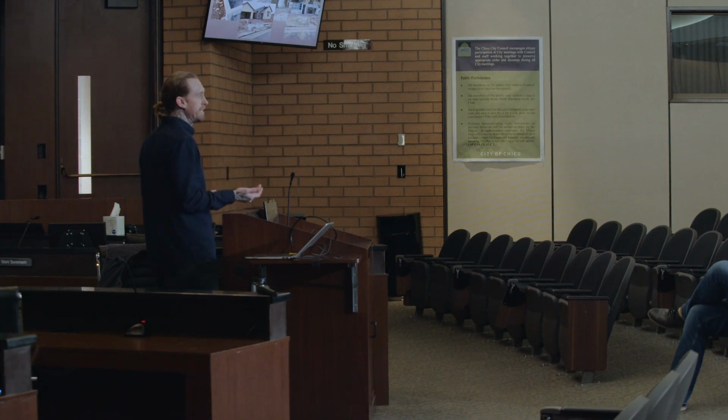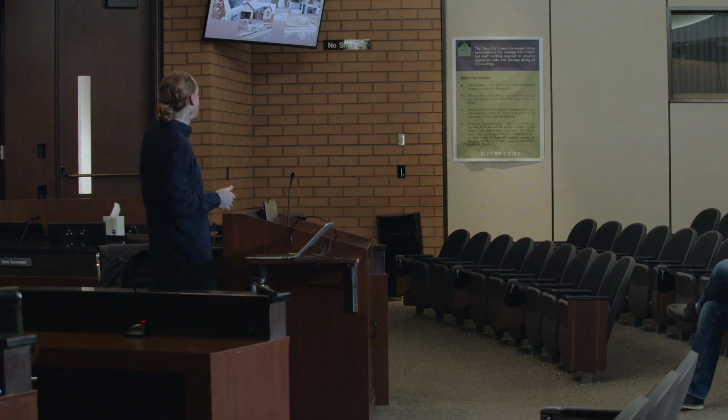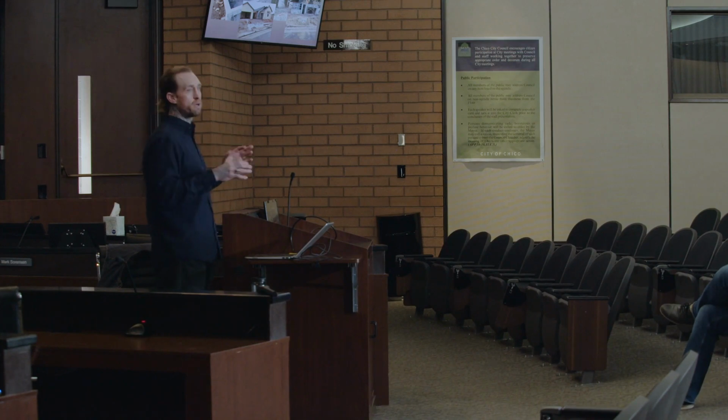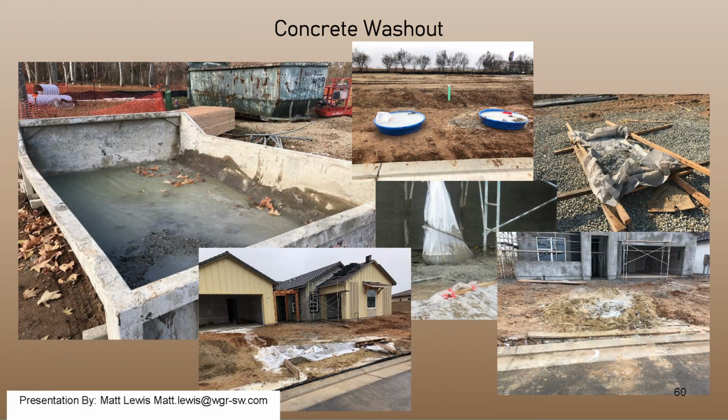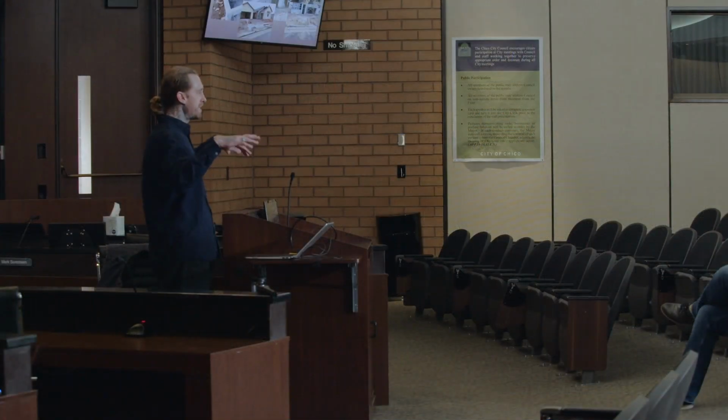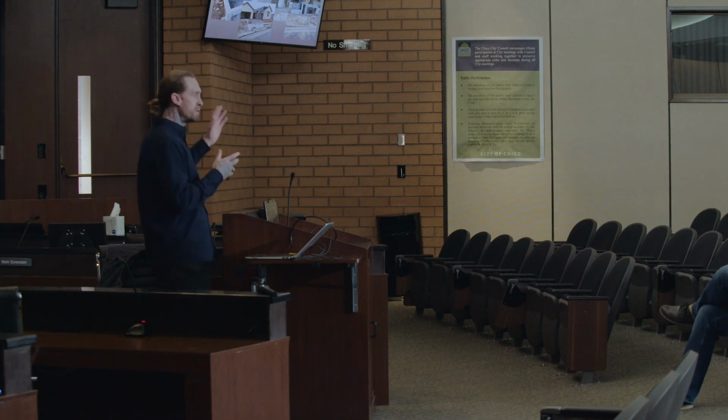That's really their only option, and that's why I always suggest to just bite the bullet and pay for the big, half dumpster. Because then, if you're on a big development, you can say, look, guys, here's where the washout is. Everyone put your washout right here. You don't have to put a kiddie pool at every single lot, which is usually what they do. And then you have someone take care of it for you.